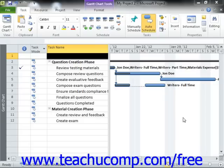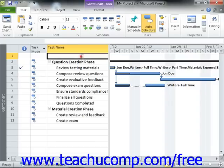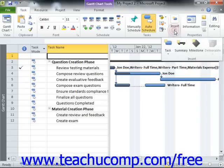To create a recurring task in your project file, select the blank task line in the Gantt chart view where you wish to insert the new recurring task. Then click the Task drop-down button in the Insert button group on the Task tab in the ribbon.